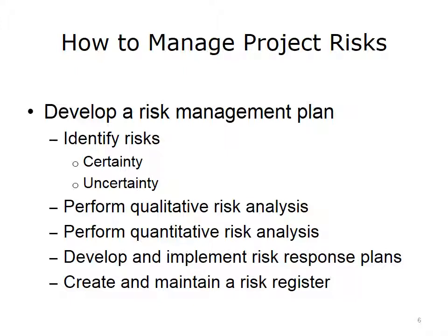As you continue through this identification and assessment process, you will be documenting each step in your risk register. As a risk is pinpointed, enter it into the register. You will update this entry after performing the risk analyses and again after developing the risk response strategies. If changes to the circumstances of the risk arise, enter those into the register as well.